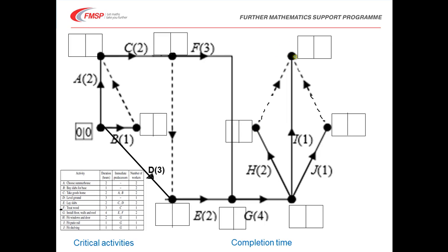They all have to finish, remember, at the finish node. So I've put dummies coming from H and from J. You could have dummies going from just 2 out of those 3 anyway, so you should have 2 dummies. So your network may not look identical to that, but it should be essentially the same, and you should have 4 dummies.